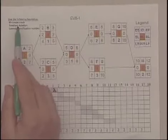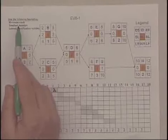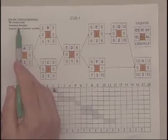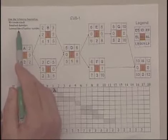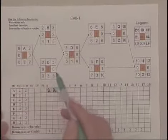First, it chooses the activity with the least or minimum slack. And if they have the same amount of slack, then the smallest duration. And if both of those are true for the activities, then they choose the one with the lowest ID number. In this case, C has zero slack and B has two weeks of slack.